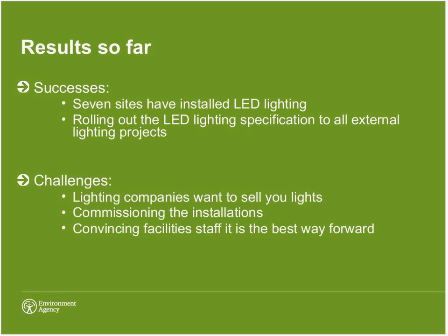We were concerned about compatibility with CCTV monitoring. A lot of our high priority sites are monitored by CCTV externally. So we were checking designs with the CCTV company and sending them through, asking, are you happy with this? The advantage with LED lighting is that it's a white light, which is a really good fit with cameras and capturing camera images. So we checked the design before, and we checked after with the camera companies to see if they were getting the kind of images that they were expecting, and everything seemed very good there.